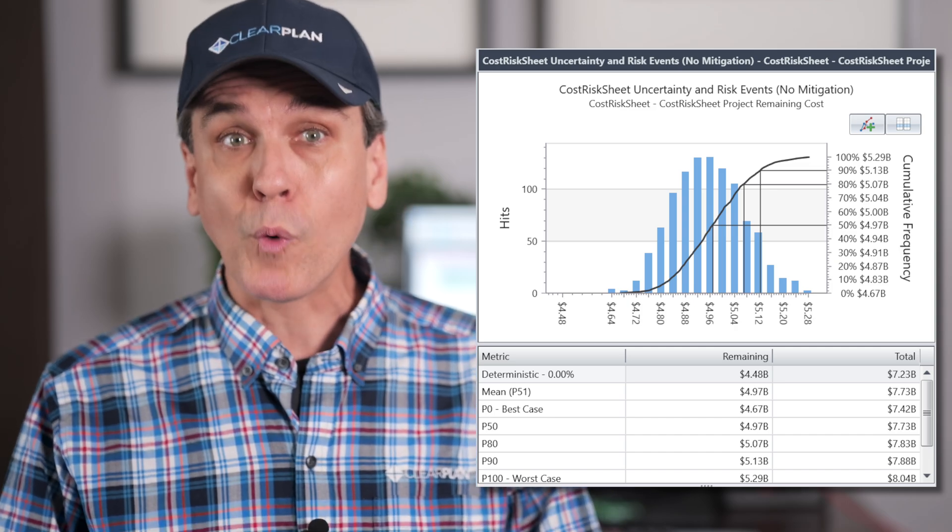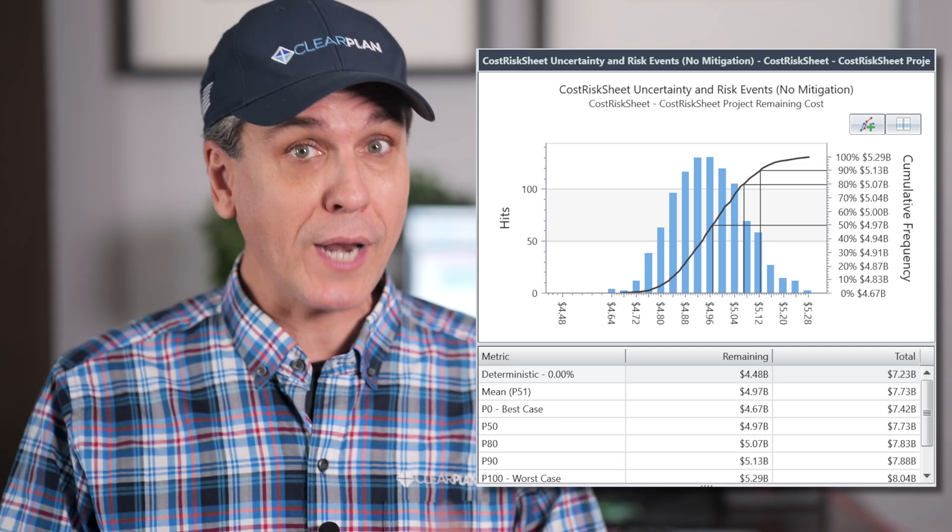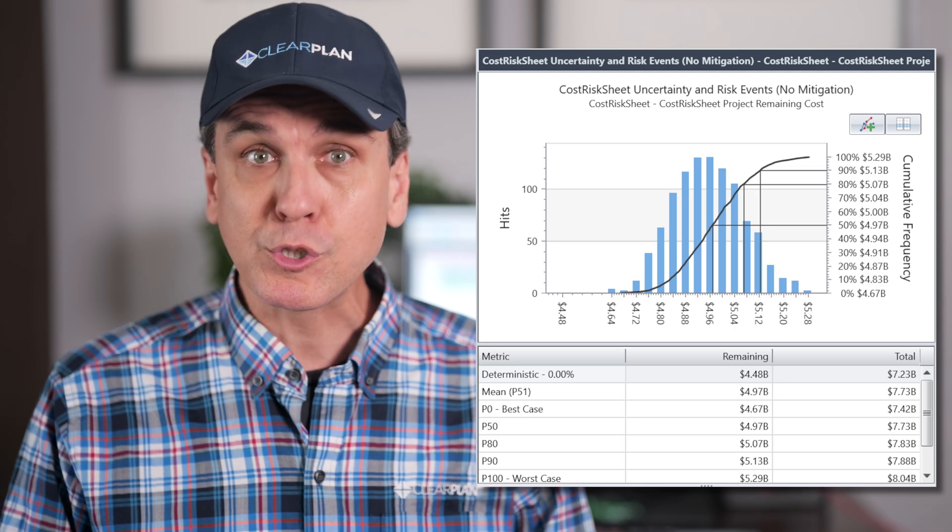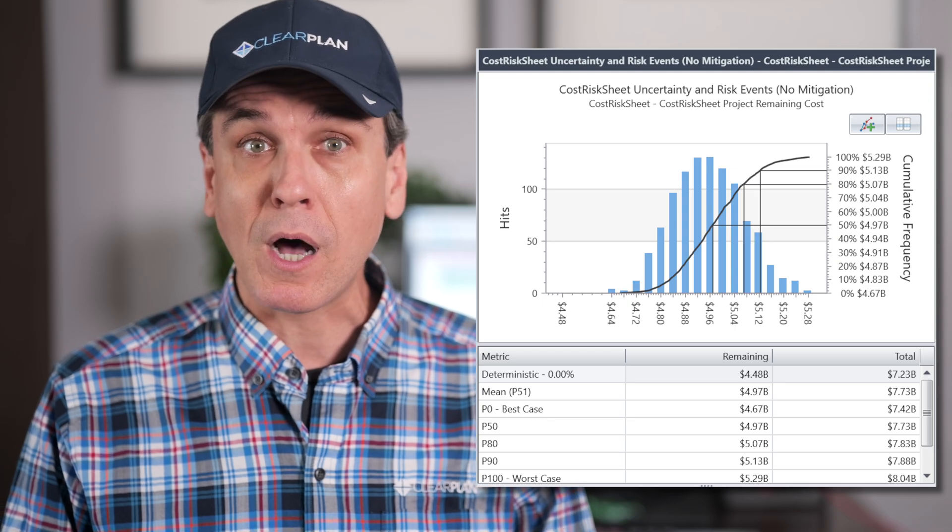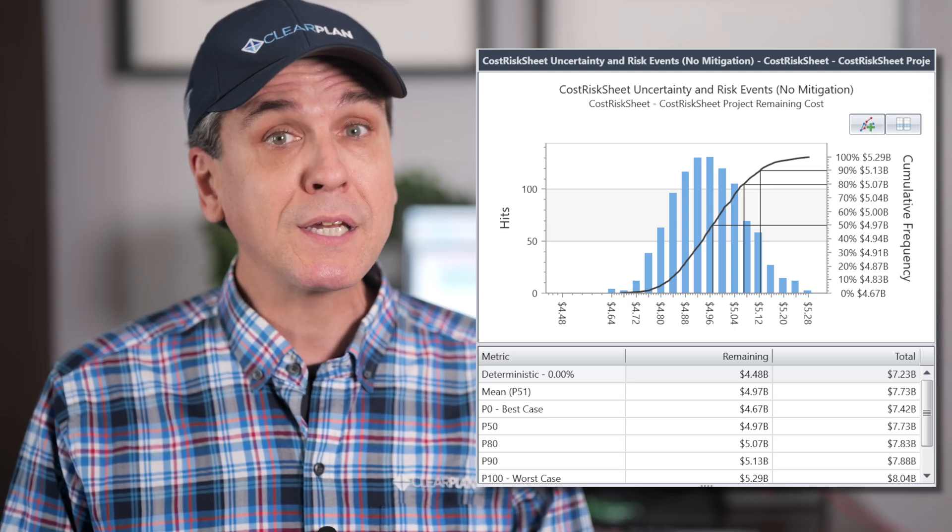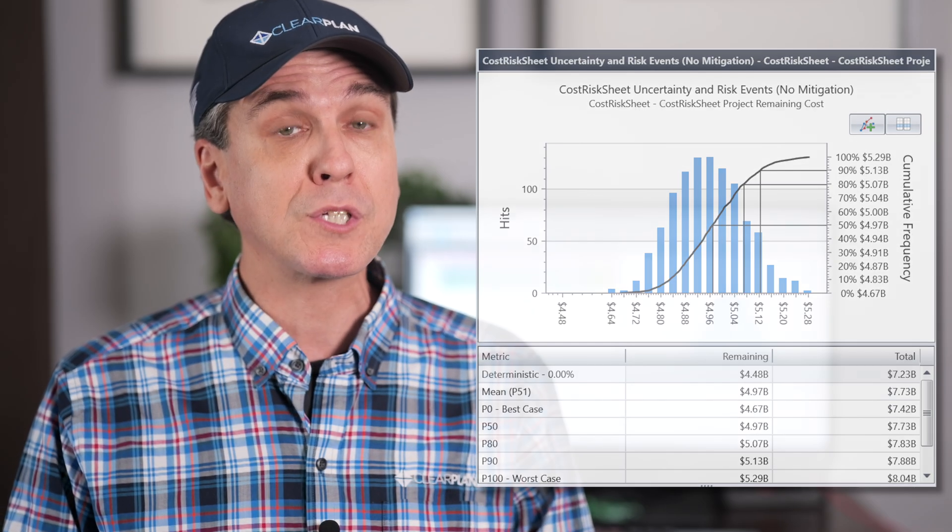Acumen Risk, the tool that I use, allows you to merge the schedule and cost models so that expected schedule risk delays will lean appropriately on cost outcomes, driving the risk-adjusted project cost forecast higher based on schedule risk. I realize that this is a very technical topic and chart, but I do want to make sure that as you use risk software and look at these charts, that you're not just running them.